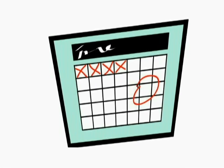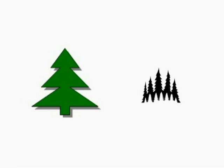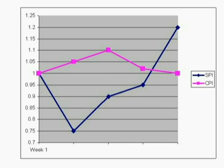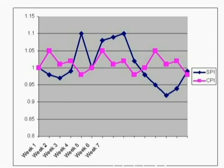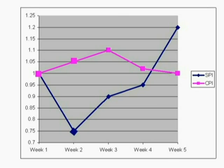You need to schedule your earned value calculations so that they allow you to control the project, but not so often that you either overcorrect or spend too much time tracking a tactical activity instead of planning a strategic one. If your project duration is only one month and you only look at your progress once a week, your project could be half over before you calculate earned value and discover you're so far over cost that you'll never recover and have no reserves. For a project of six months, once a week is a good place to start, but you need to adjust based on current project status. If your SPI chart is within 5% either side of plan, you may choose to take no corrective action. But as the SPI starts to go over 5%, you should adjust the measuring period to a shorter duration in order to have more control over project execution.